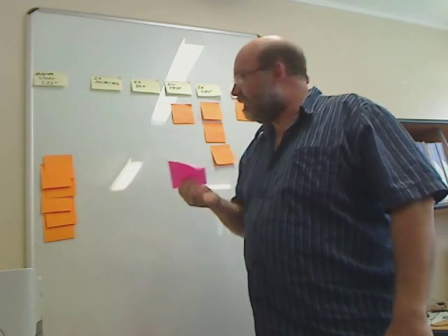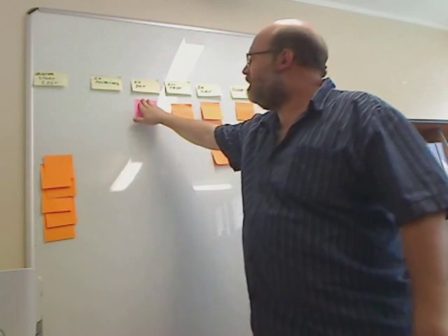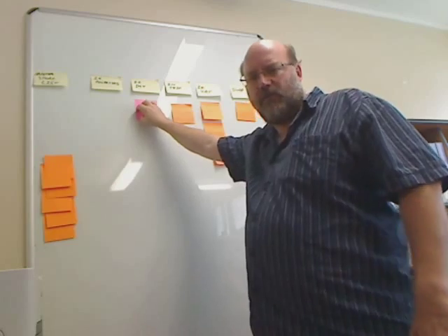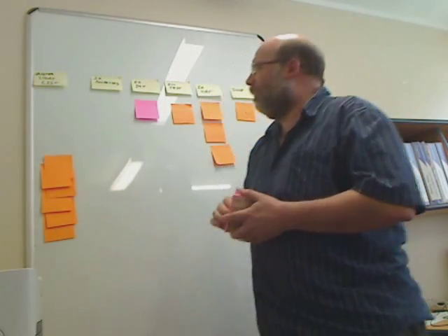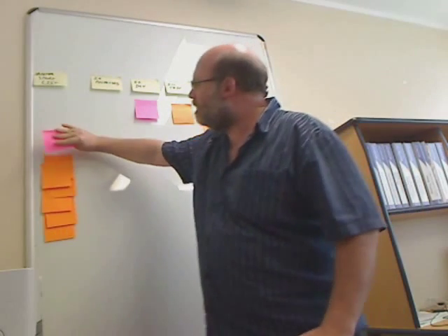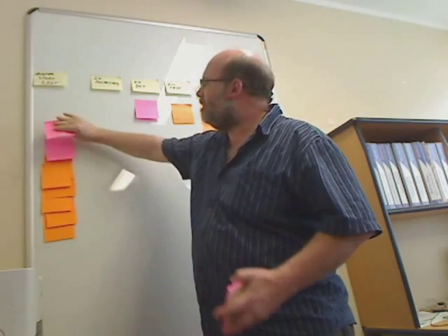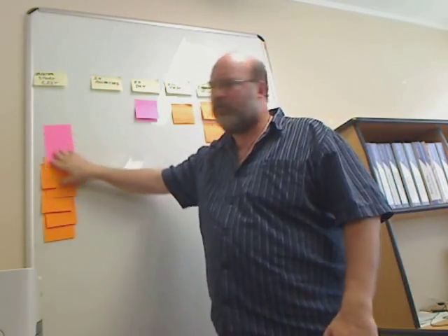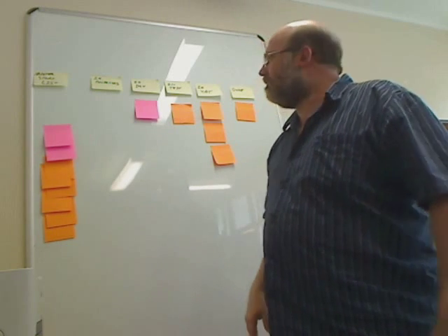That story is a defect. If it's a severity 1 or 2, it goes straight into the in-dev column and it must be addressed before anything else. If it's a Sev 3 or 4, it would go onto the master story list, onto the backlog, and it will be prioritised and sequenced along with all of the other work during the next iteration planning meeting.